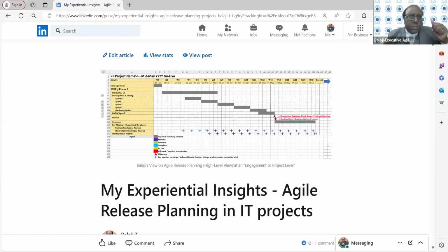That is why we put sprint zero. Whether sprint zero is correct or not as per the agile literature, I'm not interested in that aspect. My aspect of thinking is whether it is appropriate to the context or not. You may need to take a trade-off call between being correct versus being appropriate to the situation. You cannot get onto iteration one without doing enough due diligence in the discovery phase. So from that perspective, we still put in a discovery phase.